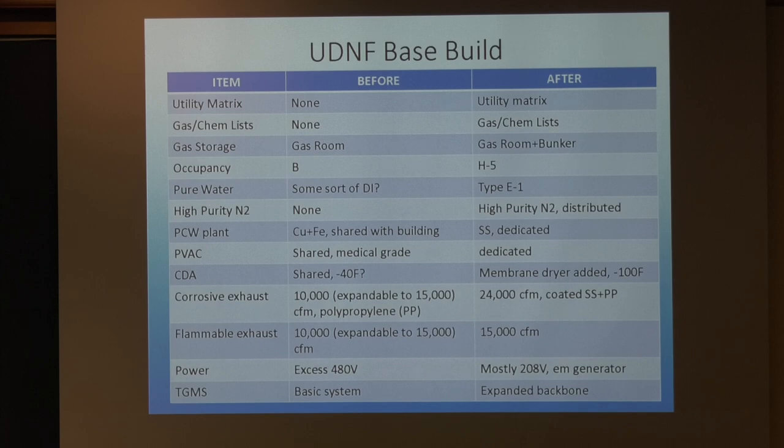This compares what I found before and what I accomplished after. There was no utility matrix at the University of Delaware. I couldn't find any gas, chemical, or tool list. There was no tool layout. The gases were supposed to be in a gas room. I added a bunker because that gas room was not able to support the pyrophorics.